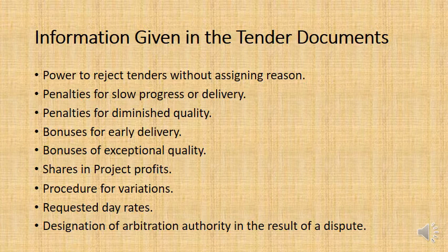So first off, there would be a mediator, and a mediator will be trying to help the two parties come to a compromise that both are happy with. An arbitrator is where they can't come to a mediated, compromised agreement, and basically the arbitrator is making a decision and saying, okay, Avan, you've got to pay Cardo, or Cardo, you need to fix up the finishing work on the paint, or whatever.